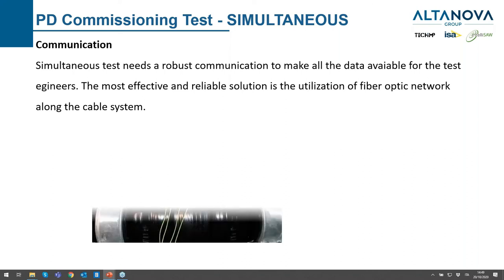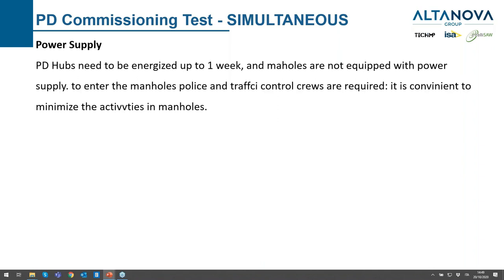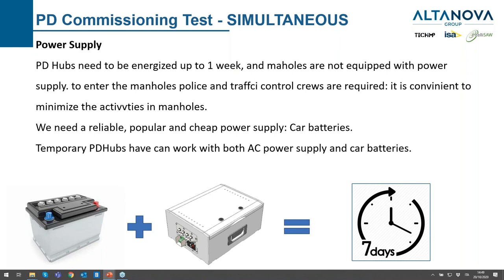Another requirement on site is the power supply, since we need to energize the PD acquisition units for many days to complete the job, or longer if problems occur. We need a reliable, easy-to-find, and cheap power supply. The solution found was car batteries — the temporary PD acquisition units have been developed to be energized with car batteries. With this configuration, we install everything, connect the acquisition box to the car batteries, close the pit and the joint bay, and we will have communication with the acquisition units for seven days.